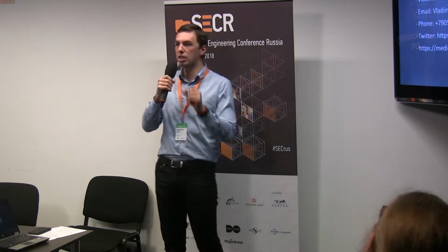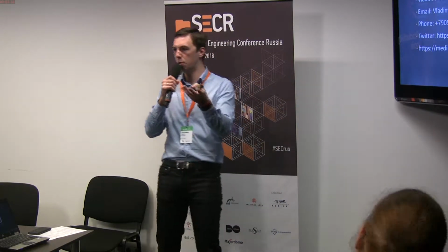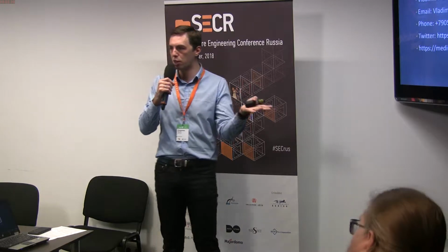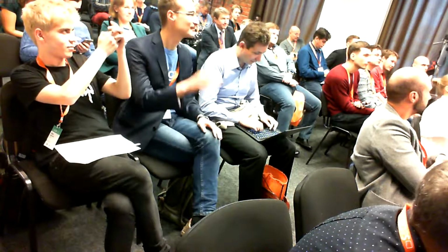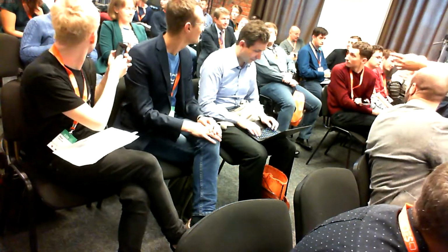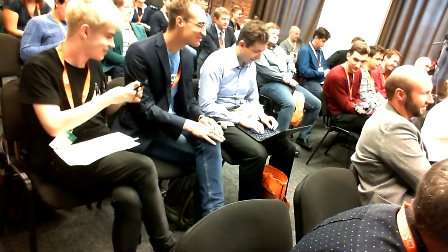And if the customer understands that he wants to change anything, we just look at that change, and if it is a really small one, just add some button here, we're just doing it. And of course, it depends on the type of engagement or the type of contract, because if you have time and material, if you have fixed price and so on, there are nuances, but this is really the responsibility of the account manager.